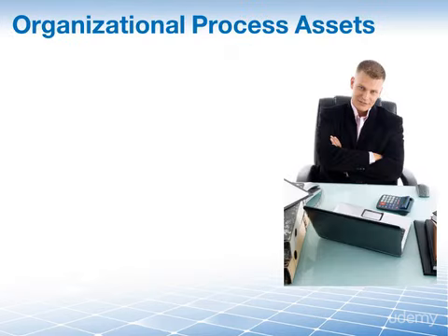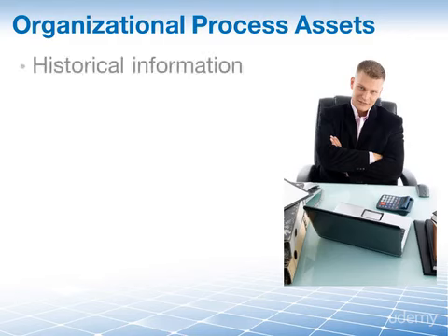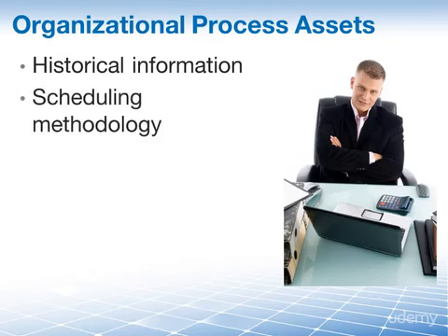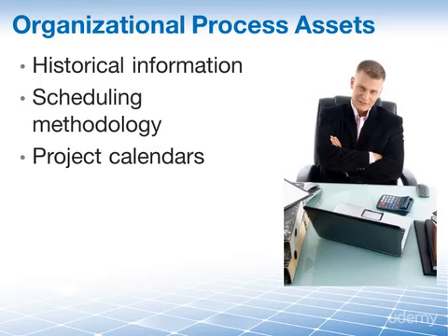And you are going to need the organizational process assets for similar reasons. Our organization may have collected information that will help us in estimating. This could be historical information on durations, or there could be a scheduling methodology and project calendars and calendar of working days which are relevant and need to be considered. Or we may have the lessons learned files from previous projects at our disposal, from which we can learn about how they estimated and how well they estimated and how on target they were in the end. So it's always good to use your organizational process assets in this way.